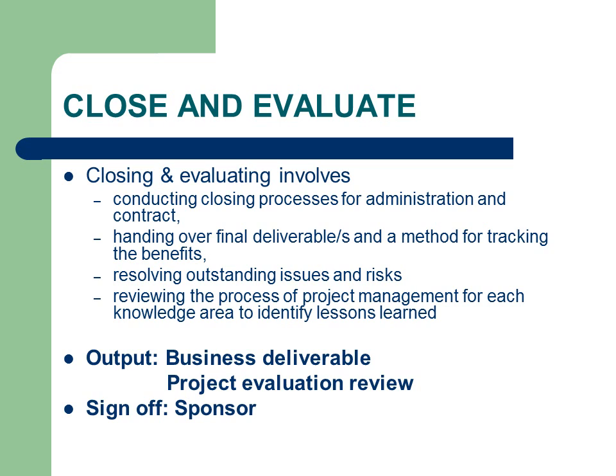The closing phase must include formal handover of the project deliverables to the customer and final sign-off. All knowledge areas must be reviewed to ensure that there has been a formal close down of their associated plans and that there are no loose ends. In addition, the project should be formally reviewed by the stakeholders in order to analyse the successes and also to identify any lessons learnt so they can be applied to future projects. A formal report called a Project Evaluation Report or Post-Implementation Review Report is produced and signed off by the project sponsor.